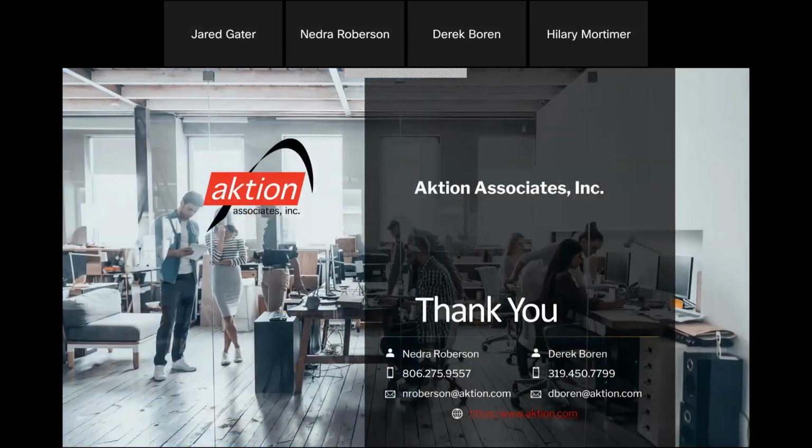Yes. Thank you. So it does look like I just had a question come in here. So Sabrina asked, are you able to define the workflow for an hourly project setup, look at the office location to pull in the proper rate table? In parentheses, she then put in, we have different rates by location. So that sounds like something probably a Derek question then. Yep, and you're absolutely right. Everybody defines office location a little bit differently. That could be inside your profit center there. It could be another field that's on there. But yeah, if we have that to use and we know it's going to match back to something, we can totally use that to pull in the rate tables so they apply appropriately by location.